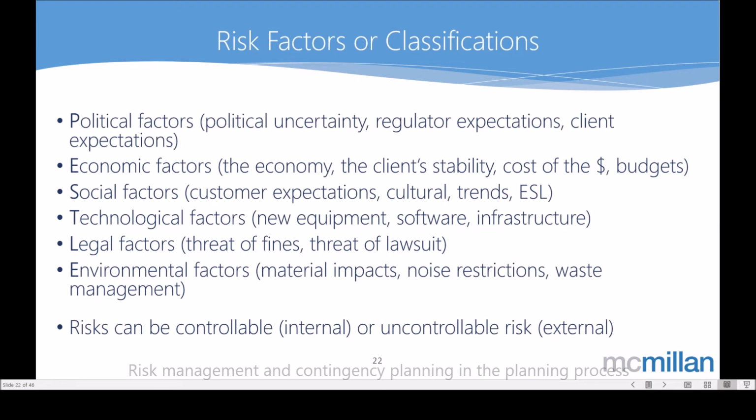Legal factors, such as the threat of fines or lawsuits, or breaches of arrangements or agreements that we may have. Or environmental factors, which can be things such as material impacts, noise restrictions, or waste management, and so forth. So the PESTLE is a really good tool to get us to think about different sections of risks that we may use when we're consulting to identify potential risks to our plan, especially for the bigger plans.